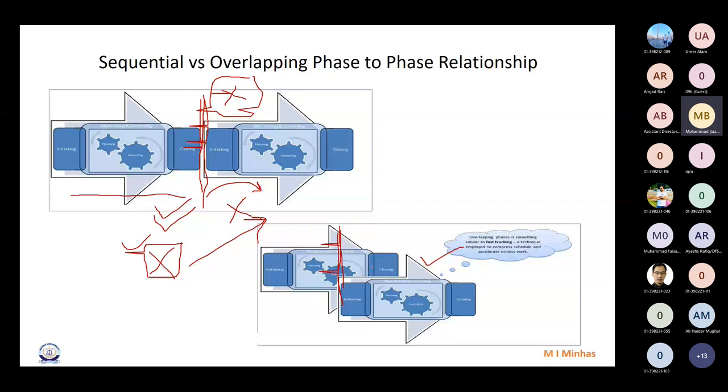Like in the example that I just gave you, you are still writing the introduction and the methodology that you will adopt for the research, and you just start the field work in parallel. After some time, you realize that things are not going well in the field work, and you had made some mistakes. In that case, you will have to come back and rewrite your introductory part, isn't it? Whenever we do things in parallel, we increase the risk. However, we reduce the schedule.